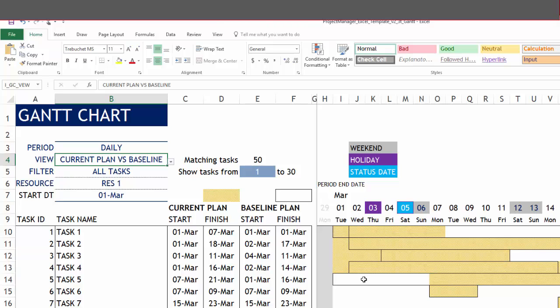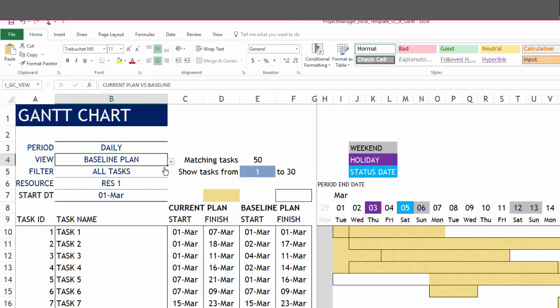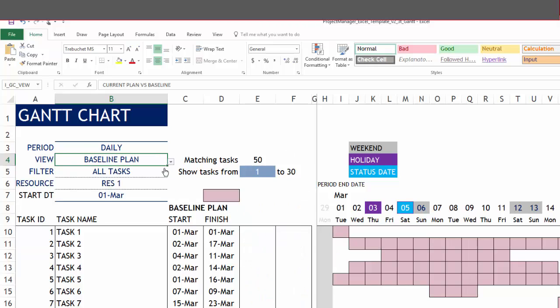For example, this task is starting later than the baseline plan versus these tasks are starting ahead of the baseline plan. You can see the comparison easily in this view. Let me put it back to baseline plan.